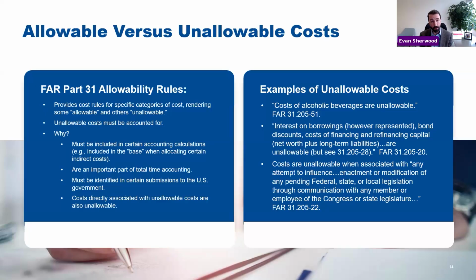If you have tooling that can only be used on that contract, maybe then it's a very different situation. But that's true about your termination costs generally. You may have folks in overhead positions that are not needed anymore as a result of a termination, right? I mean, that goes to the larger business. You know, their portfolio might have gone from 50% this contract to 10% something else, and you have questions about what can be sustained. So the short answer is no.